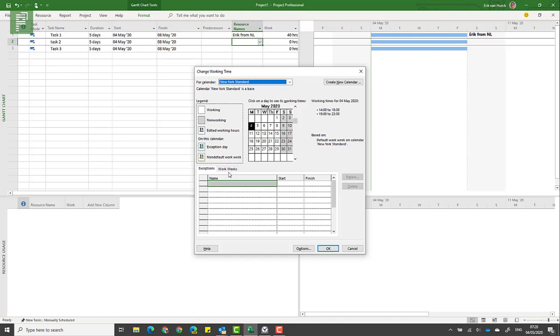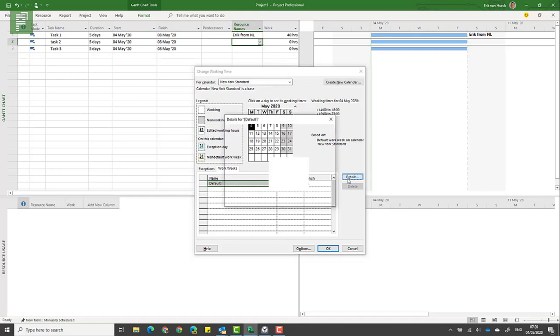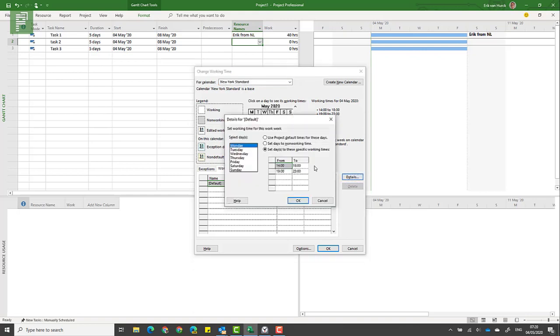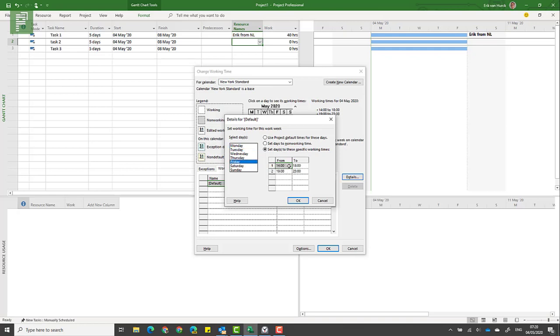Let's head back over to our schedule. Here the New York working weeks look like this. If I go into the default and I click on details, I would see that I have set that to a specific working time for Monday till Friday, and it starts at 1400 hours for my time zone and ends an hour before midnight.